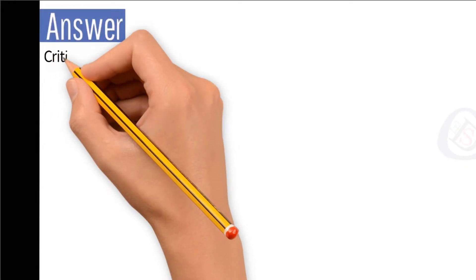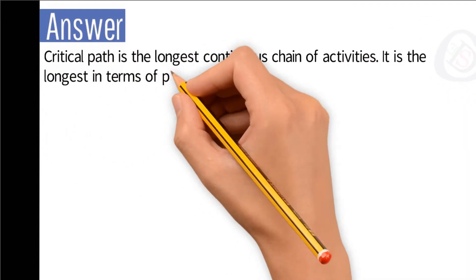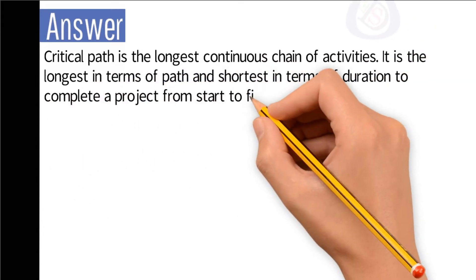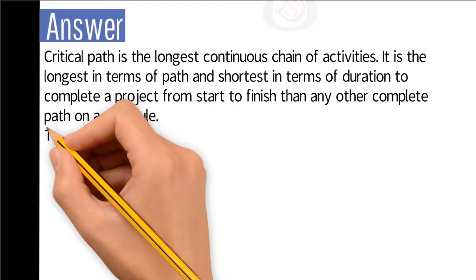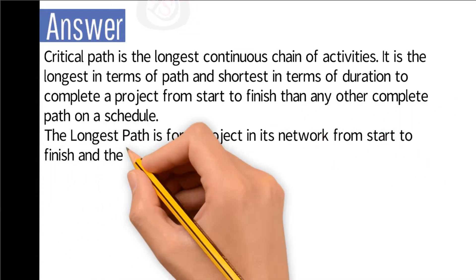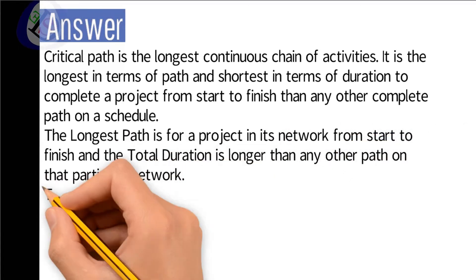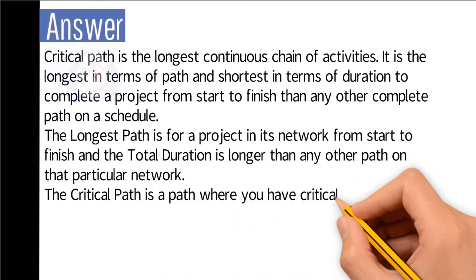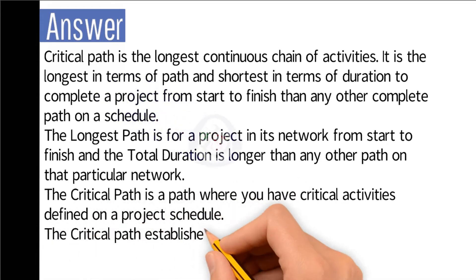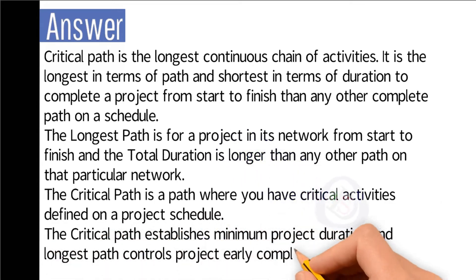Question number 56: Is the critical path the longest or shortest? Answer: The critical path is the longest continuous chain of activities. It is the longest in terms of path and shortest in terms of duration to complete a project from start to finish compared to any other complete path on a schedule. The critical path establishes minimum project duration and the longest path controls the project's early completion.